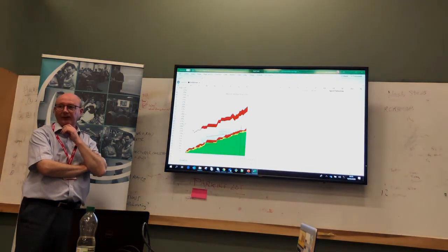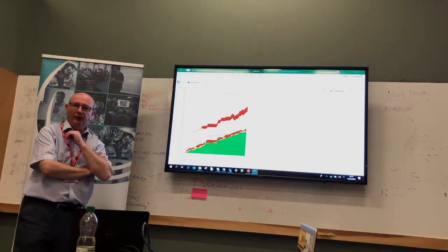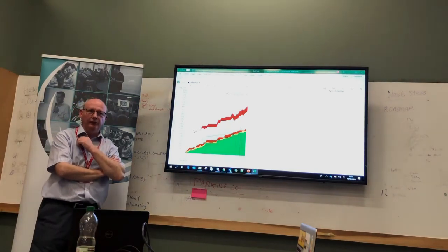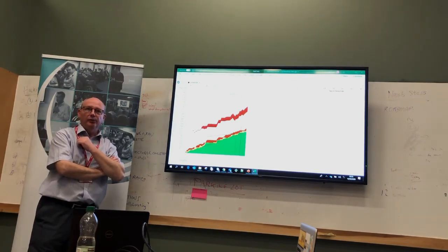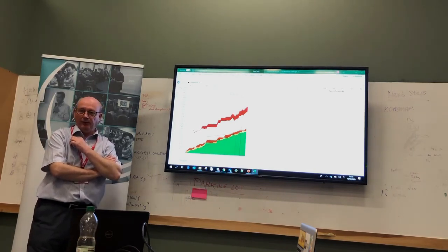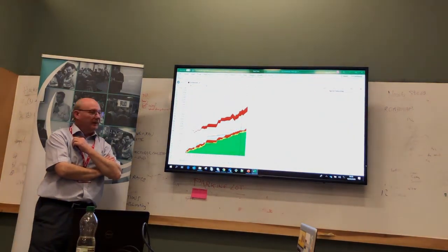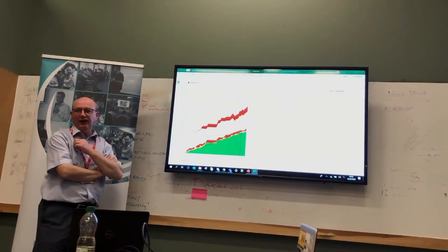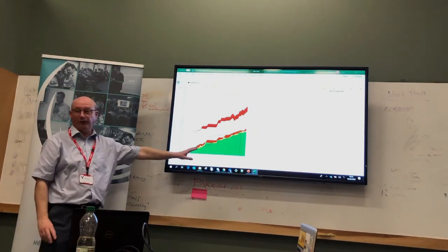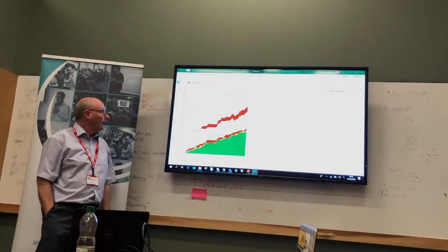Well, this team does vary in its story points between 2 and 13. They don't tend to use 1 in their range. They can never quite bring themselves to tell us something is easy enough to be a 1. But we pretty much don't let them use any story points bigger than 13 because it's just crazy. Even a 13 doesn't really fit, and they're on 3-week sprints, not 2 weeks, this team.